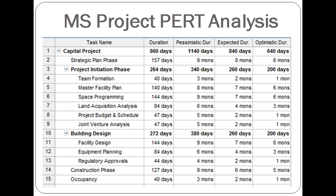Here is a table of the values that were inputted into Microsoft Project for conducting the PERT analysis. On the right are the pessimistic, expected, and optimistic projections for the duration of each of the subtasks, which are based on the input of experts. For the entire project, in a pessimistic scenario it will take 1,140 days, in an optimistic one 640 days, and in a realistic case about 840 days. Once inputted, a single estimated duration is calculated based on all three of these values.